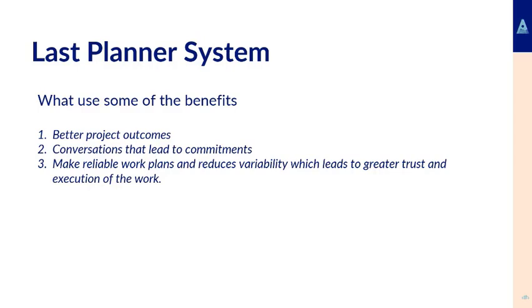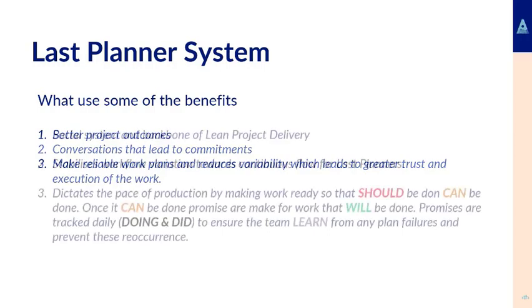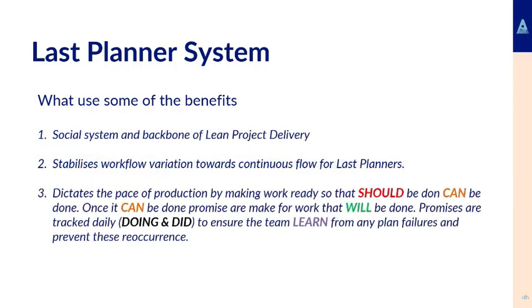If I'm a Tarmac contractor and I finish that work next week, then I know I will likely have the next phase of work to complete the following week, so I keep my gang together on this job for the duration of the works. So I build reliability and trust into the actual program, and that comes back to a lot of what we're trying to do.